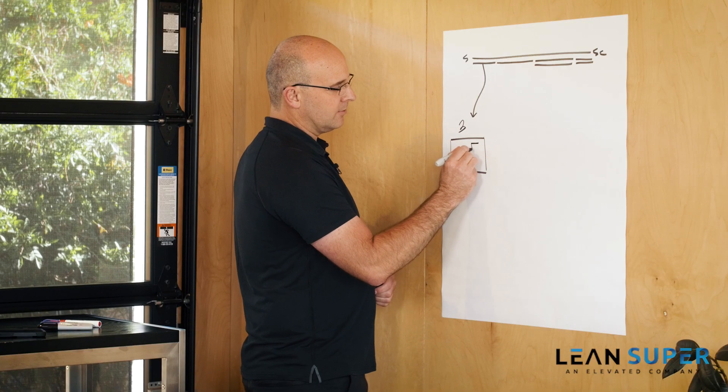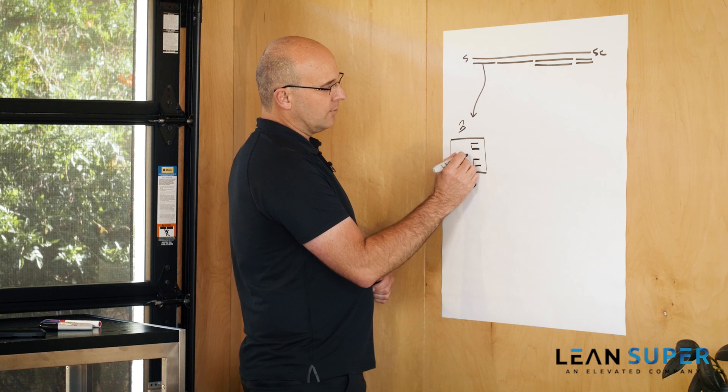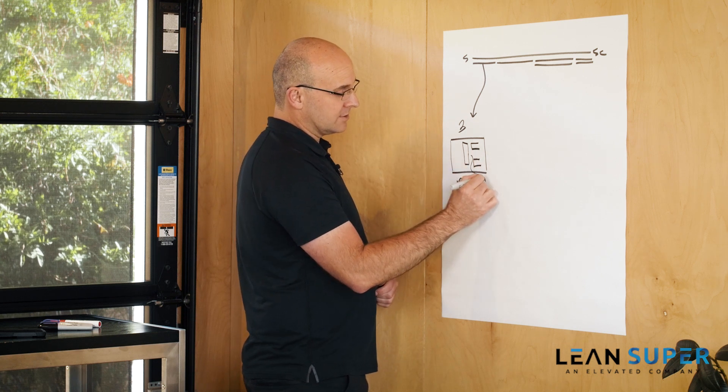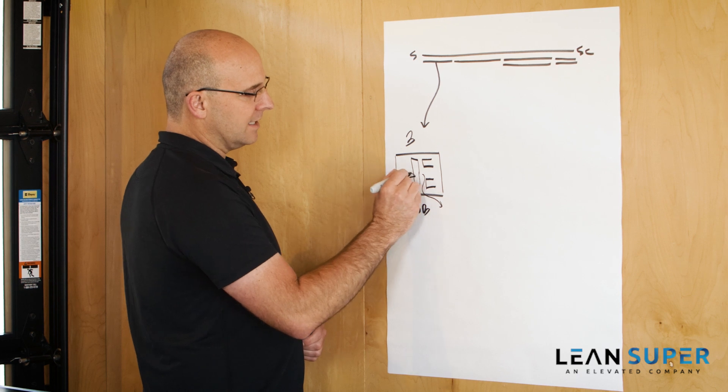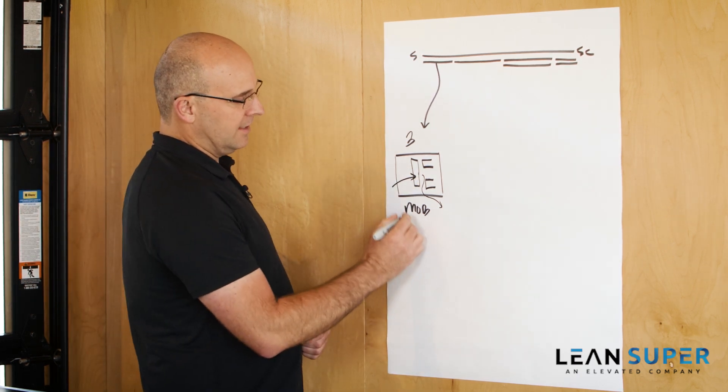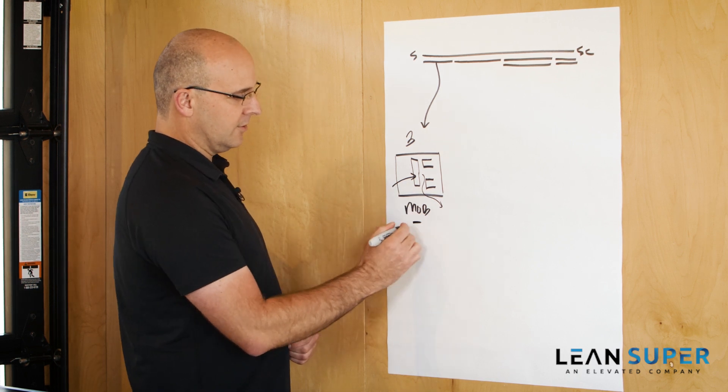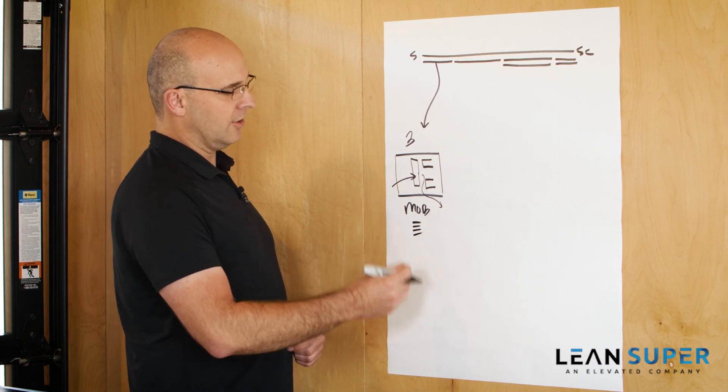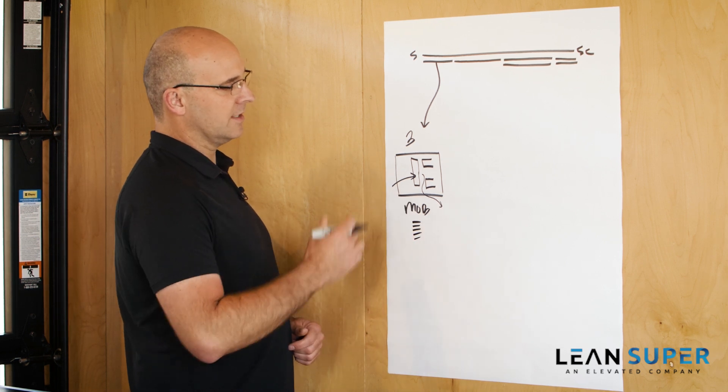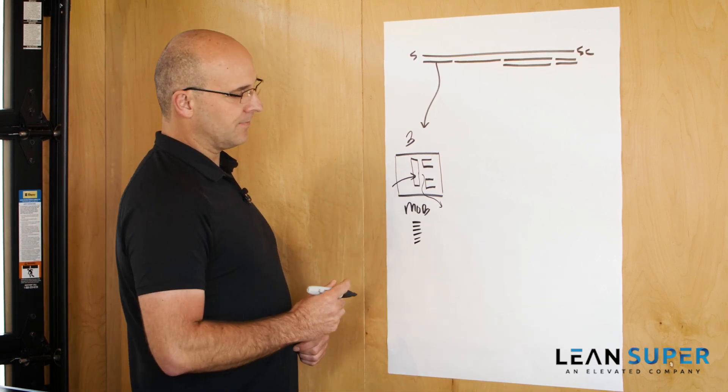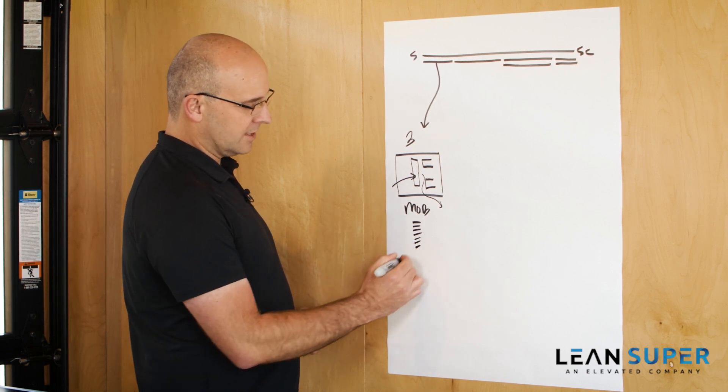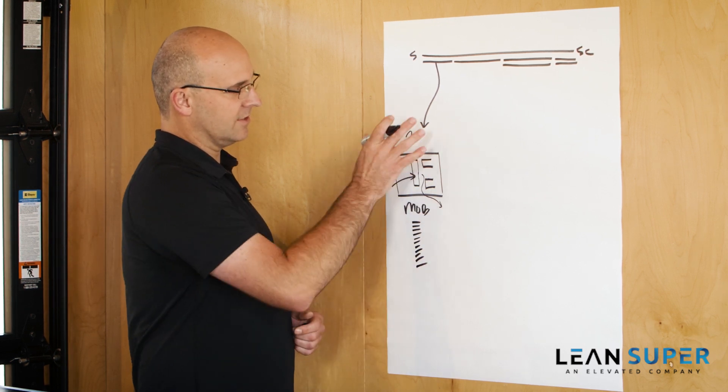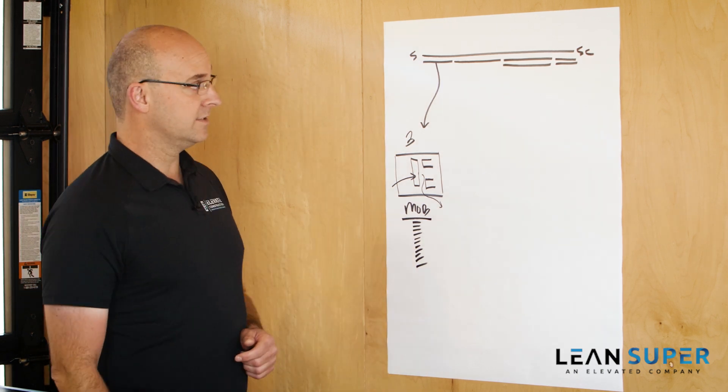So I'll give you an example. On one project, I remember here were the two existing buildings, and we were able to only take over a portion of the parking lot so that all of the cars could start to exit. And we were mobilizing and taking over half of the site to begin with. In this part of the logistics planning, you're establishing your traffic control, your site fencing, your access and egress, your phasing of existing occupants out or existing motorists in a parking lot out and away. You are establishing all of your SWPPP. You're making sure that your dust is under control, any screening, any signage, any enclosures on the project, and you're starting your excavation. So this is very specific to the mobilization phase of your project.